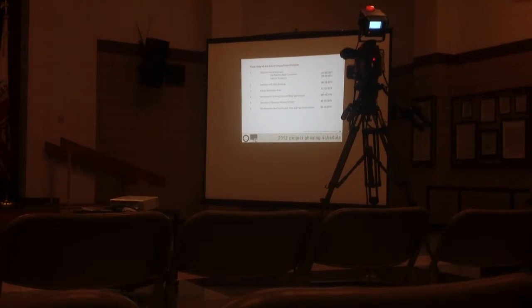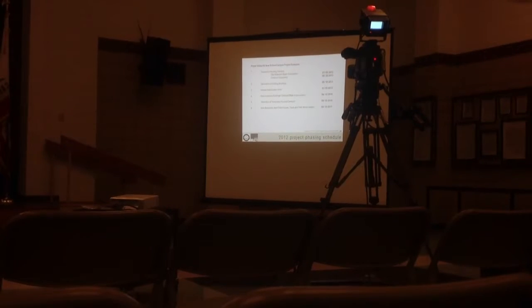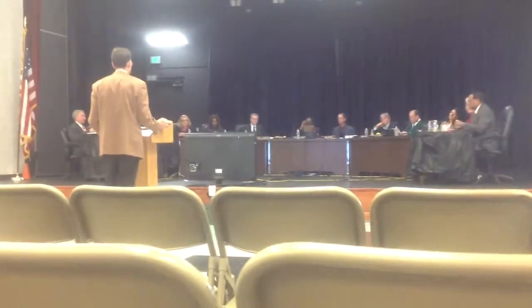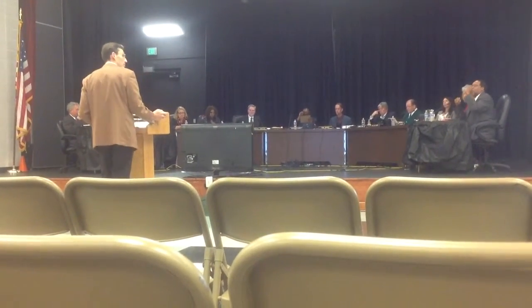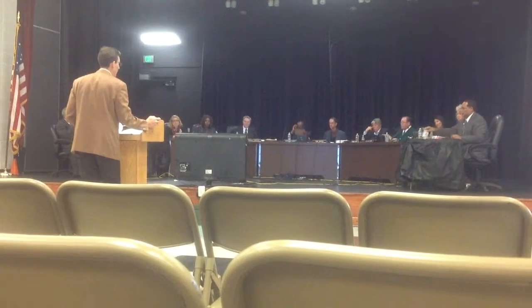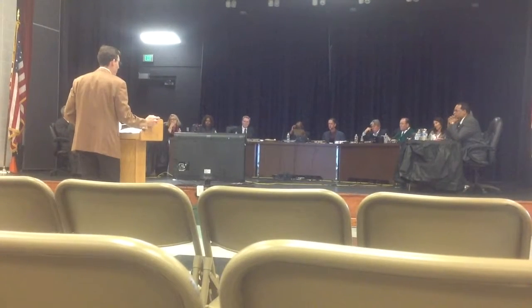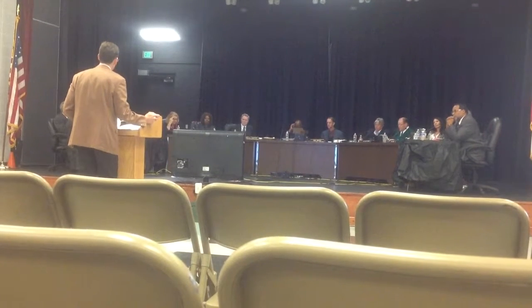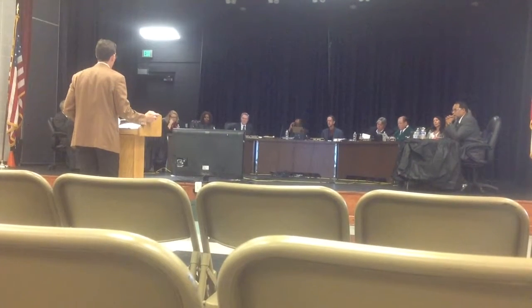Well, as more understanding of the project occurred and the project got larger, additional phases occurred that weren't anticipated, including the hillside stabilization work. So in 2012, the project went from approximately 5.5 years, which is pretty standard for a project like what we originally anticipated, to nearly 7 years. So we added a year and a half to almost 2 years to our project schedule.